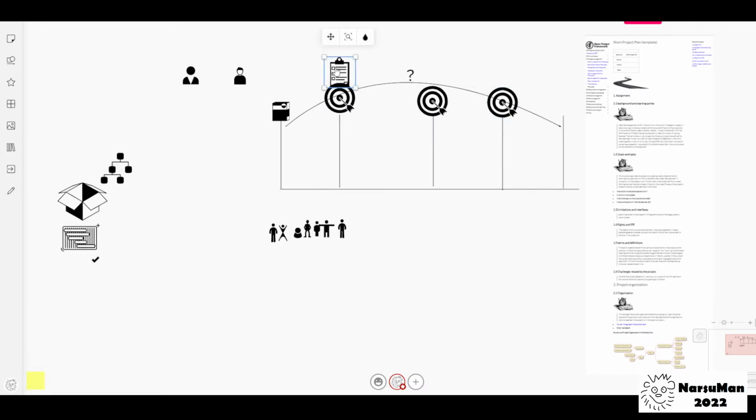So these checkpoints can change in what is being checked. For example, it can be just checking the documentation and plans: are they correct, and is the project going on quite well. The next point is that you have to show something concrete that you have achieved with the development. And we have to plan these days beforehand, because then we have to build our team and our resources according to these goals or gates, as we call them.